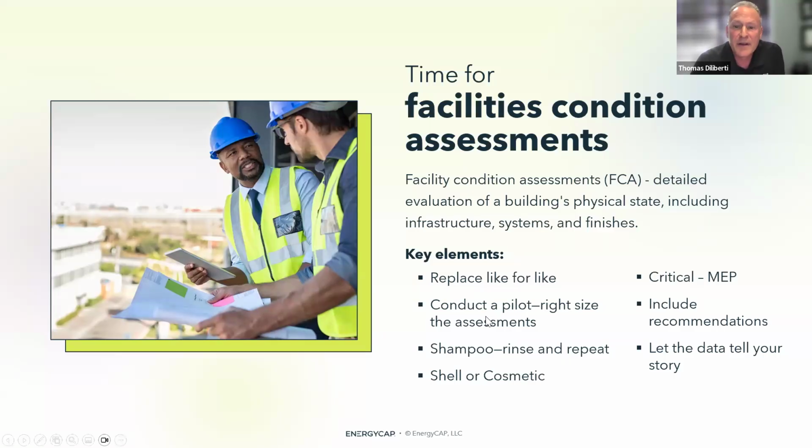Another recommendation I'd have is conduct a pilot to right-size your assessments. These companies many times can do whatever you ask them to do, from finding all the little details to just giving you the high-level overview. So make sure you right-size your facility condition assessments to match what your goals are. And once you go through a pilot or two, then I would say let's just do rinse and repeat. Then you can repeat it over the course of all of your other buildings.